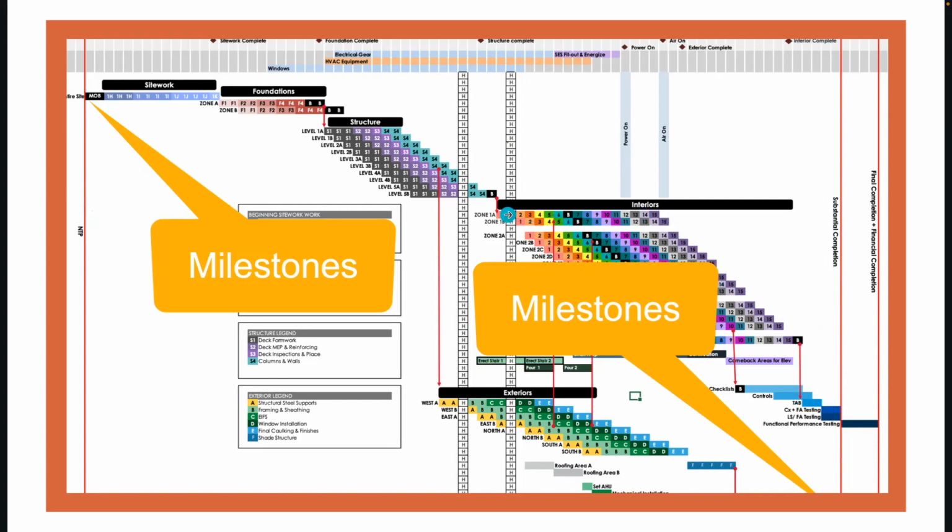phases and the structure within it and do what's called optimization, which means that the ratio of Takt wagons, Takt time, and zones will decide how fast these phases are going. And so you can optimize without burdening trades and have these phases go faster depending on how many zones you have. And so really great Takt practitioners will be given a start date and an end date, and then they will fit the Takt plan within.